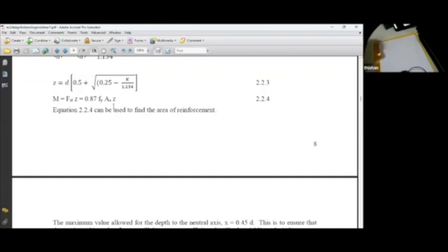Out of that, half belongs to the client. So the client gets a saving of 500 million. The contractor also gets a saving of 500 million. So from this 1,000 million, the fee of the value engineer is 100 million, 10%, and the value engineer gets 100 million. The contractor gets a profit of 400 million. So without doing a single thing, by doing value engineering, the contractor gets 400 million.